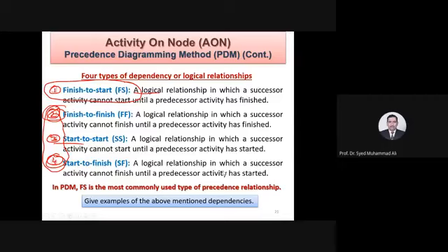اس کا بھی سوچ سکتے ہیں کہ یہ کون سی ایکٹیویٹی ہو سکتی ہے. مثلاً اس میں یہ ہو سکتا ہے لاجیکل ریلیشن شپ ان وچ سکسیسر ایکٹیویٹی کین ناٹ فنش انٹل پریڈیسیسر ایکٹیویٹی ہیز اسٹارٹیڈ. سم ٹائمز ایسا ہو سکتا ہے کہ آپ کی کچھ چیزیں، مثلاً کوئی چیز آپ آرڈر کر رہے ہیں، آپ نے ایکسکیویشن کر دی ہوئی ہے، کیا پتا ایکسکیویشن کو تھوڑا سا بڑھانا پڑ جائے بیکاز آف سم تھنگ وچ ہیز ٹو بی اسٹارٹیڈ وچ از ویگ ایٹ دا مومنٹ. یو کین تھنک آف دیز تھنگس لیٹر آن.